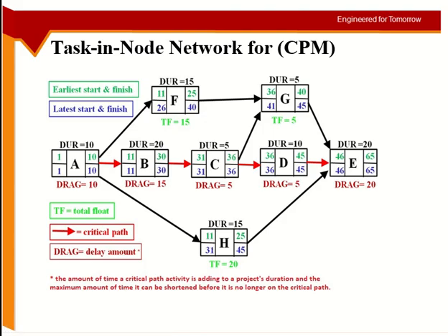It cannot start until all the arrows before it have finished. H has only one arrow, which goes to A, and A finishes on 10, so H can start at 11. So 11, 11, all of them.